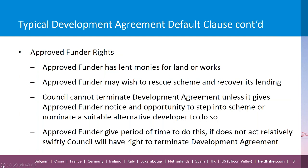The approved funder has typically lent money to the developer to buy land or undertake works and may wish to rescue the scheme and recover its lending. The typical default clause says the council cannot terminate the development agreement unless it gives the approved funder notice and allows it the opportunity to step into the scheme or nominate a suitable alternative developer — normally a period of months. You might want to consider whether a longer period is appropriate in the current environment. If the approved funder does not act swiftly, the council's right to terminate normally arises.